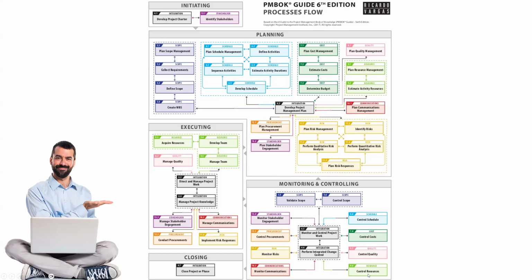And all of them, in their own capacity, with their own specialization, they process and analyze that data. And the processed data, the analyzed data, is then called the work performance information. You remember when data is processed, it is converted into information. So now all of these controls have created work performance information, and they submit it to monitor and control project work. That is their boss.